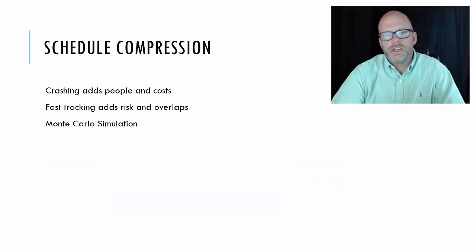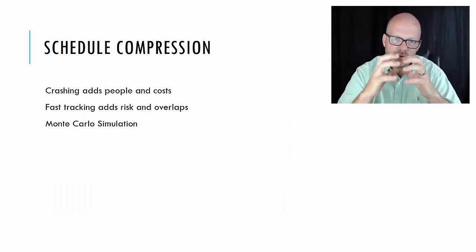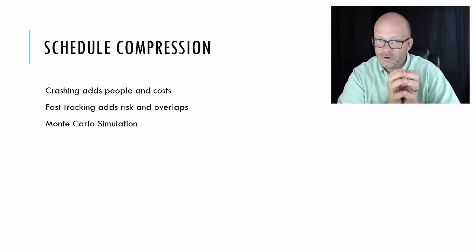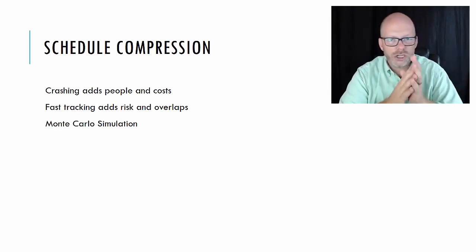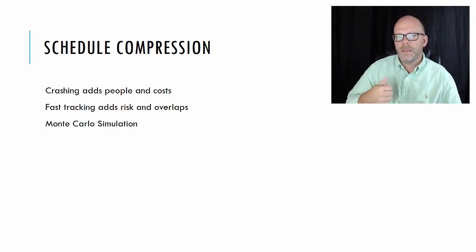Then we have schedule compression. Schedule compression means how can I compress the schedule? How can I make my schedule tighter or get done faster is the goal. Well, crashing means you add more labor, you add more people to the activities, but this drives up cost.